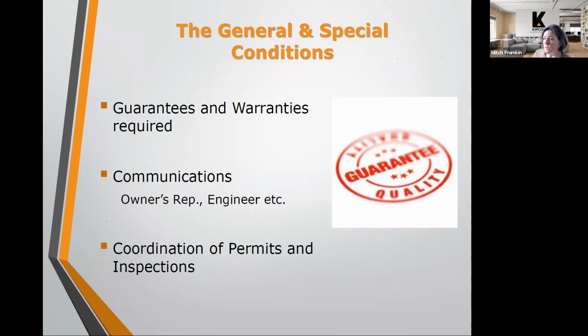Or if there's a specific type of communication between the contractor and any of the other parties. For example, the contractor is responsible to notify the engineer of their schedule or any changes in the schedule. So those communications are very important.